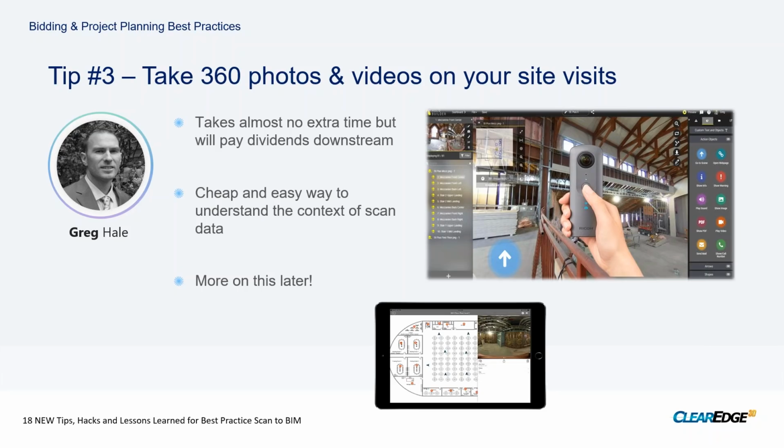And as you're taking those images, you're basically mapping directly onto that PDF. So how many times have you gone out to the site, taken pictures, and had to document that for somebody else and say, hey, I was standing in this room, this location, looking in this direction, and communicating that to somebody, whereas a 360 photo mapped while you're on the site can save hours and hours of time and also increase the level of communication that happens among the team.